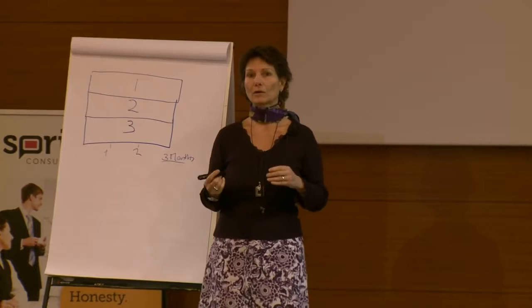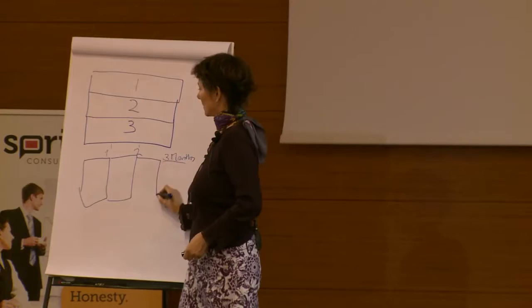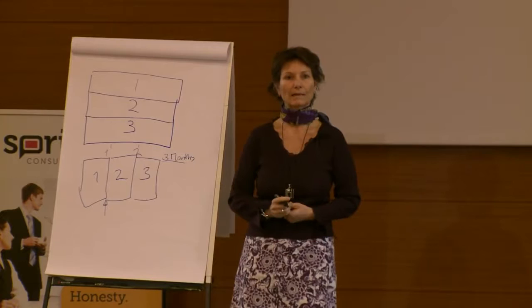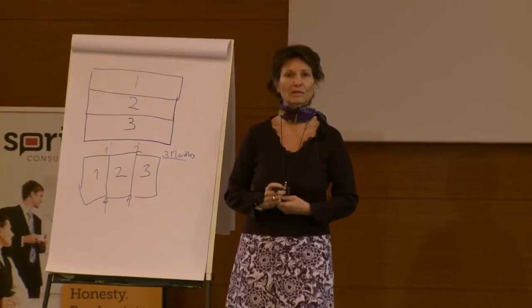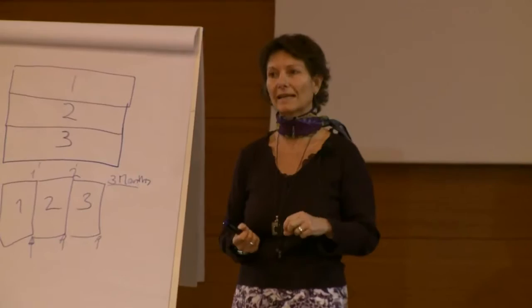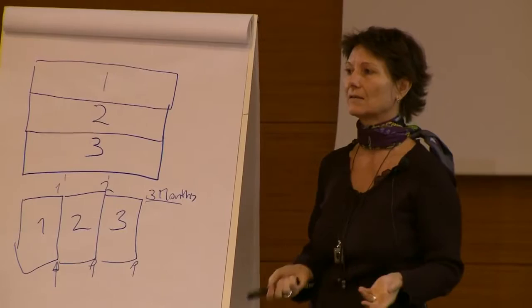However, if we would work on one project after the other, this would mean we get a first return on investment after 1 month, because this one project is done. And another return on investment after 2 months, because now the second project is done, and so on. So even if you look at it from a business point of view, it makes more sense to really prioritize, even in your portfolio, and not start to work on several projects at the same time, but rather finish one after the other, because you're making money if you do, and you're losing money if you don't.